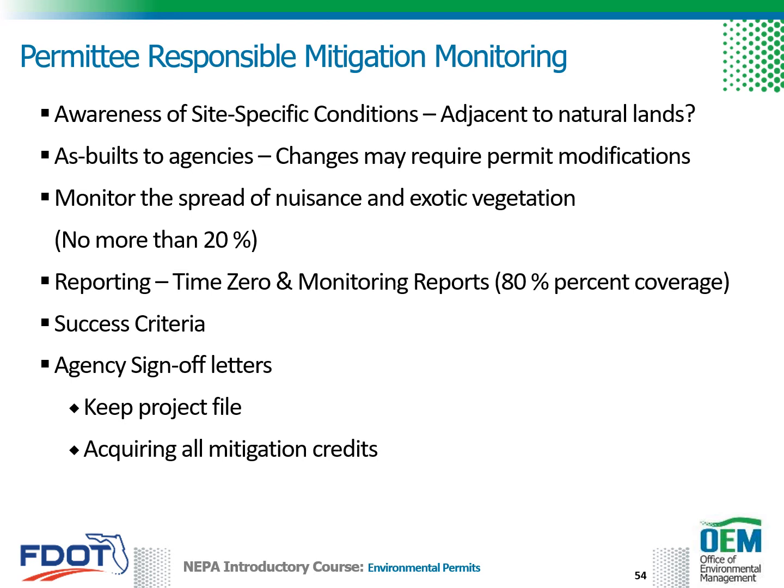Note that the release of mitigation credits from regulatory agencies for permittee responsible mitigation sites is dispersed at certain benchmarks: permit construction, as-builts, and at the end of the monitoring period.